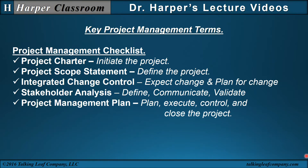Key project management terms. I have a project management checklist of five things that should always exist in a project, whether it's large or small, either formally or informally. A project charter will initiate the project because of the temporary nature of the project — the initiation of the project is essential to know that the project is started. The scope statement defines the project. If it's not in the scope statement, it shouldn't be done, and if it's done, it's in the scope statement.